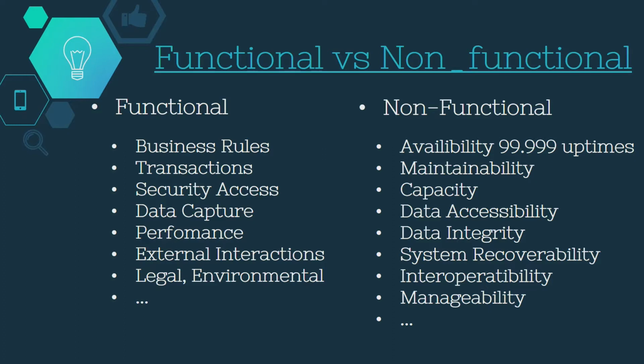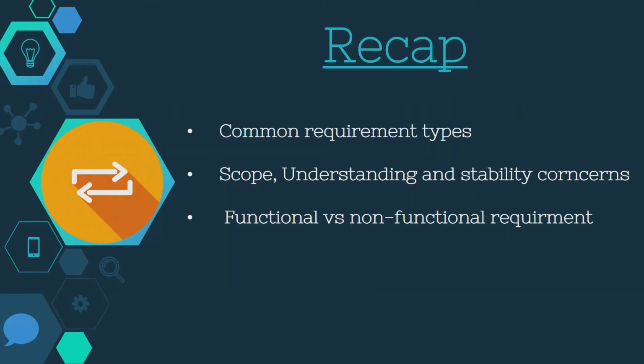There are a few issues that could arise which may complicate the process. Firstly, if you have ever been involved in a software project, you will have undoubtedly experienced scope creep. This is when those little additions get added to the project in a non-formal manner, accumulating into an ever moving goalpost. Requirements are an attempt to draw a line in the sand, a milestone or a benchmark that all parties can and should agree upon before any work is actually undertaken. This sets the customer's expectations from the start. The customer knows their problem domain the best. However, they may not know or understand what is needed to solve their business problem.